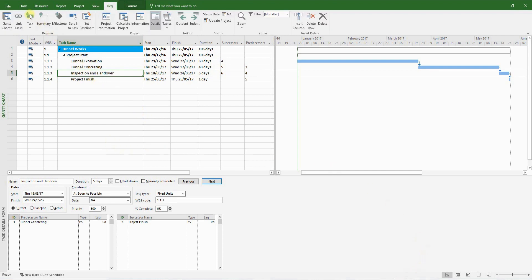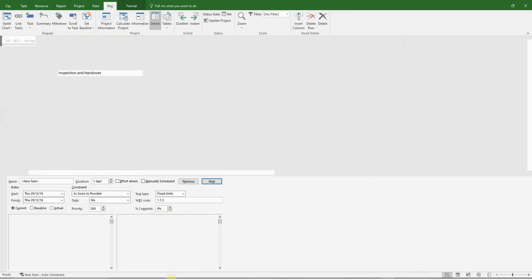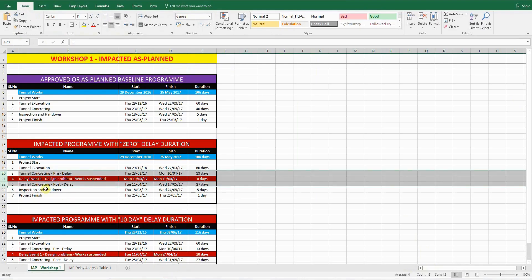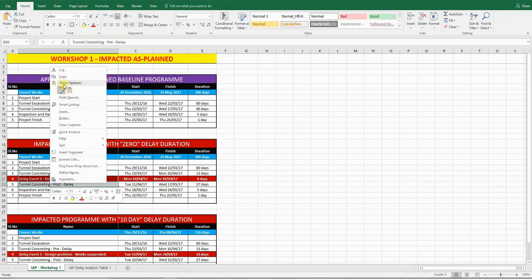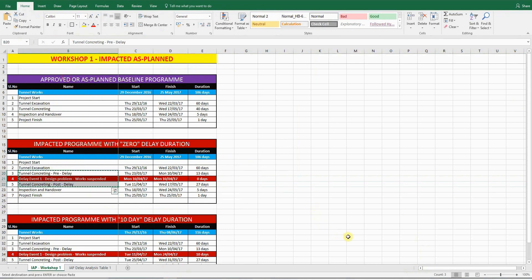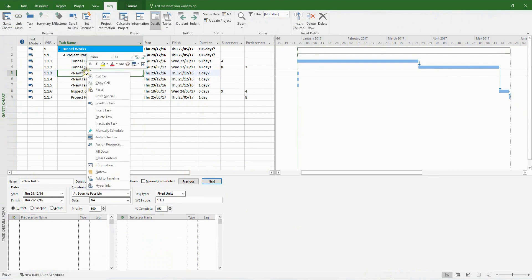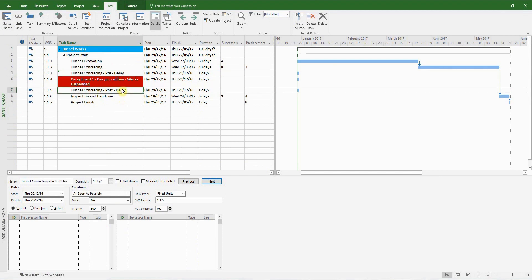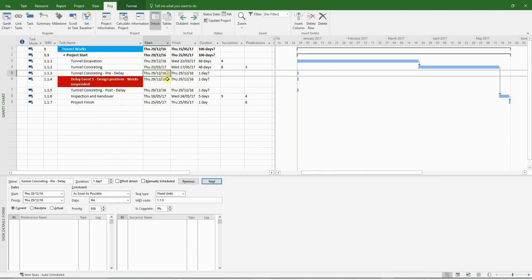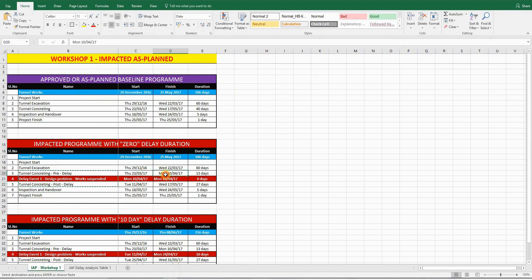Let's get to it then. So the first thing I'm going to do is add three new tasks. I'm going to go back to Excel and copy the description and paste it in MS Project. I'm just trying to save time. Typing it up will take more time. So I've literally split the tunnel concreting into tunnel concreting pre-delay. Another new activity for the delay event. And tunnel concreting post-delay.